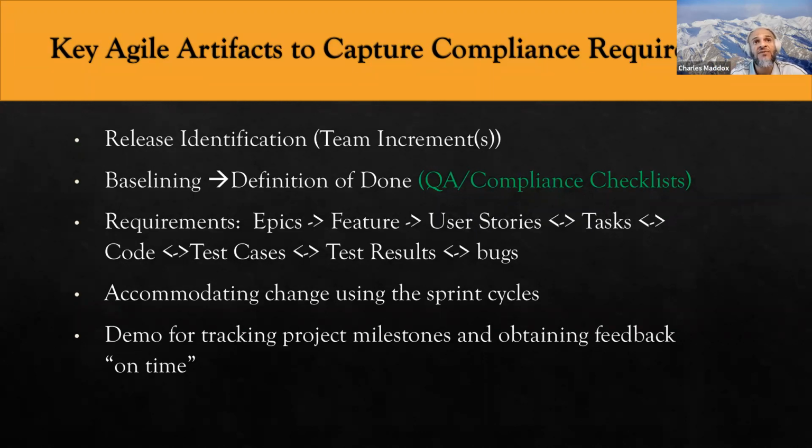And then we officially need to document that in a change management system, a change control system. There's a process around that, which could ultimately end up being a bug or a new story on your backlog. Whatever the case may be, that change can turn into an actual artifact, a traditional Agile artifact. It could be a task, a new user story, a bug, or whatever the case may be, however you choose to use those artifacts in your change management system.